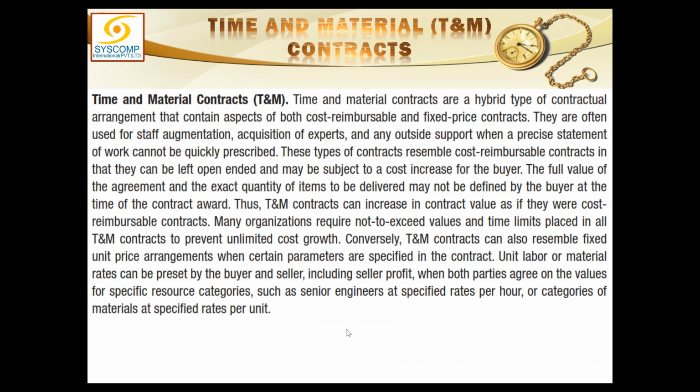Next is the time and material contracts. Time and material contracts are only used on short assignments. For example, I have to hire the services of a consultant for few hours or few days or short periods of time to do a feasibility or to give a decision or to consult or whatever.